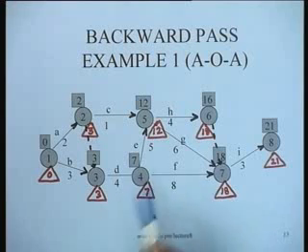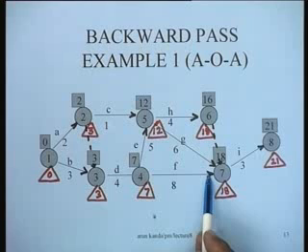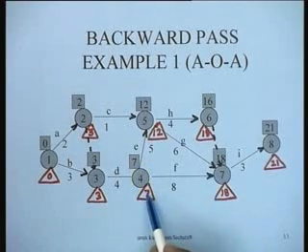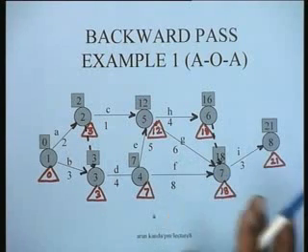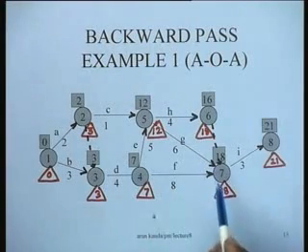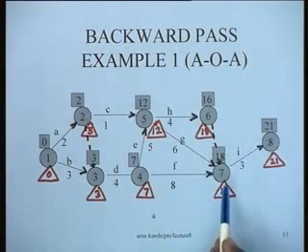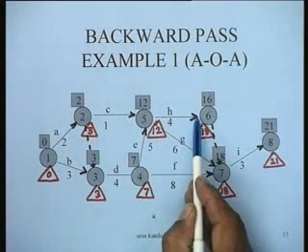These are the computations we had done, and look at this particular activity F. Once we have identified the total float for this, which is 3, the slack on the preceding node is 0, the slack on the succeeding node is also 0. So in this particular case all the 4 floats are going to be equal, because slack on preceding node and slack on succeeding node is 0.